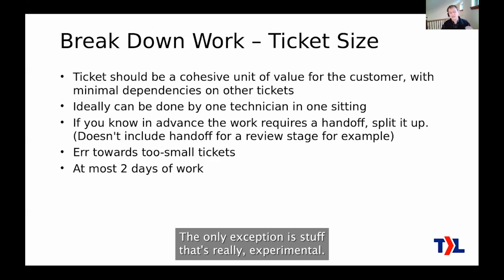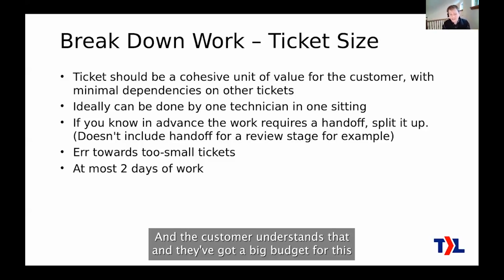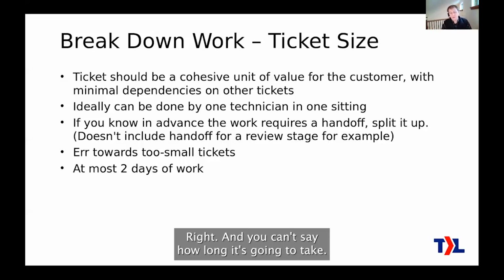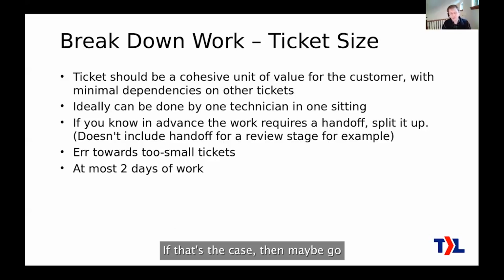The only exception is stuff that's really experimental, like you don't even know if you're actually going to be able to do it successfully, right? And the customer understands that, and they've got a big budget for this because they want something that nobody's ever done before, right? And you can't say how long it's going to take. If that's the case, then maybe go ahead and make it more than 2 days. Otherwise, 2 days.